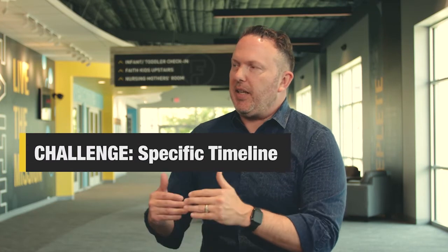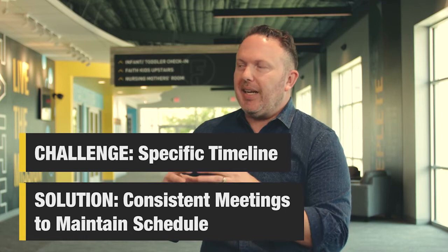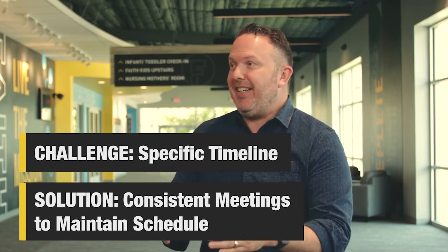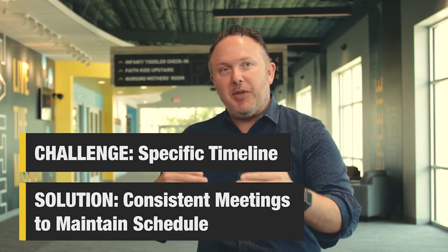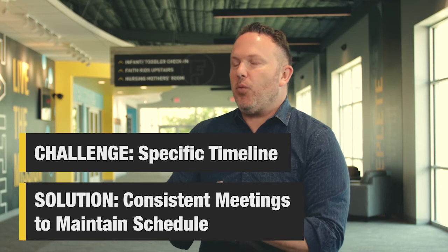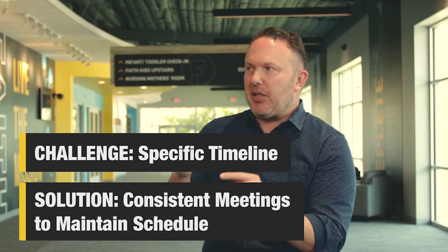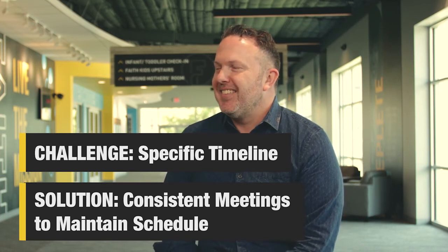I think one other thing I would throw in is that us meeting as consistently as we did helped us navigate those challenges. Instead of a bunch of things building up that we had to navigate all at one time, we didn't allow it to snowball because we kept meeting, because we had a real specific timeline we needed to hit. There was a window. You guys know this in church world. There's a specific timeline when you need to hit certain things. End of spring and summer were our construction months, and we had a specific timeline to nail. Those consistent meetings helped us stay on timeline and get in on schedule. Huge win.